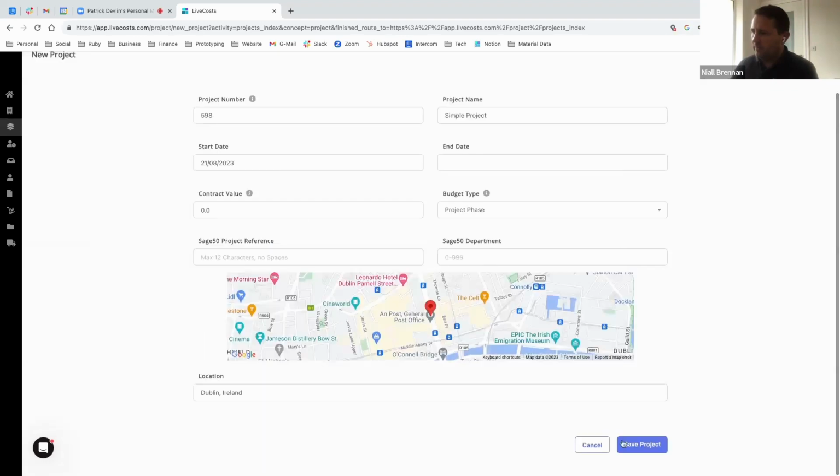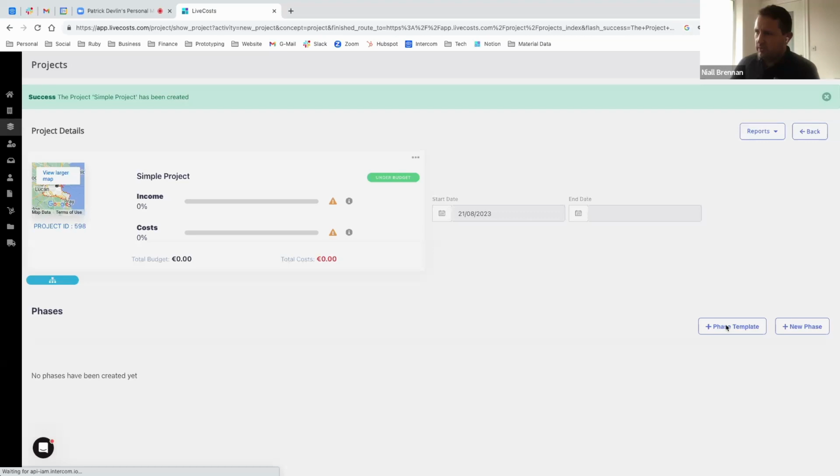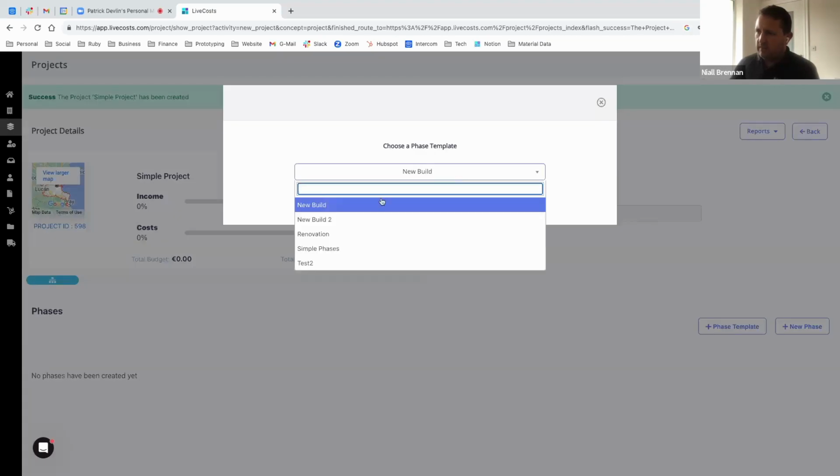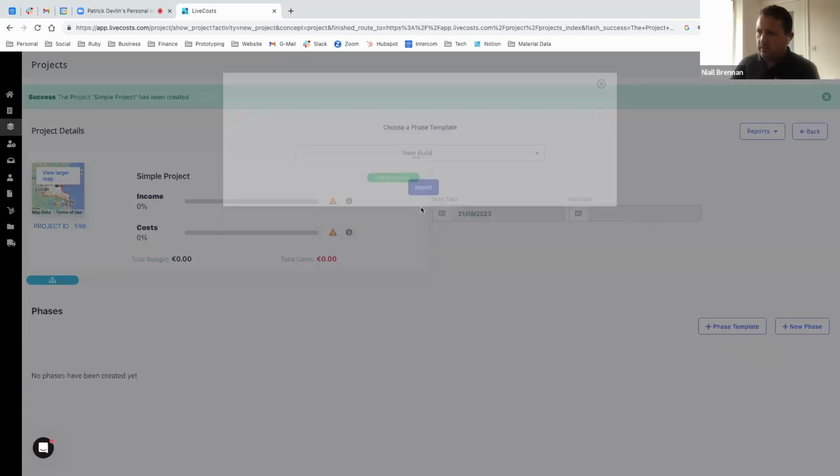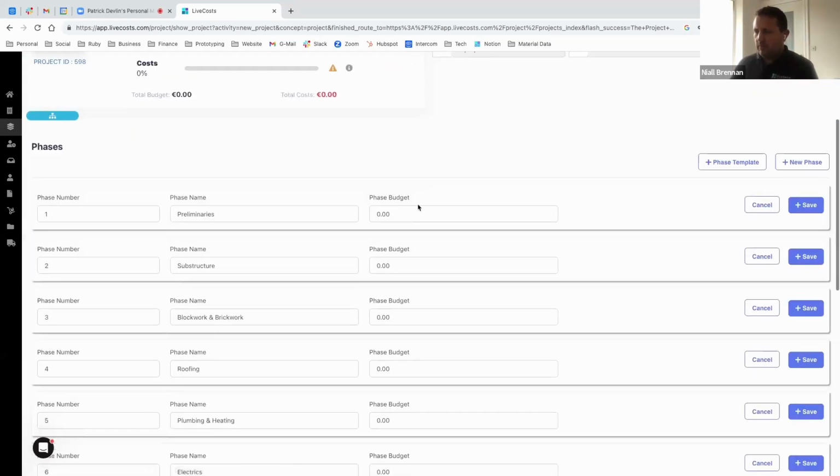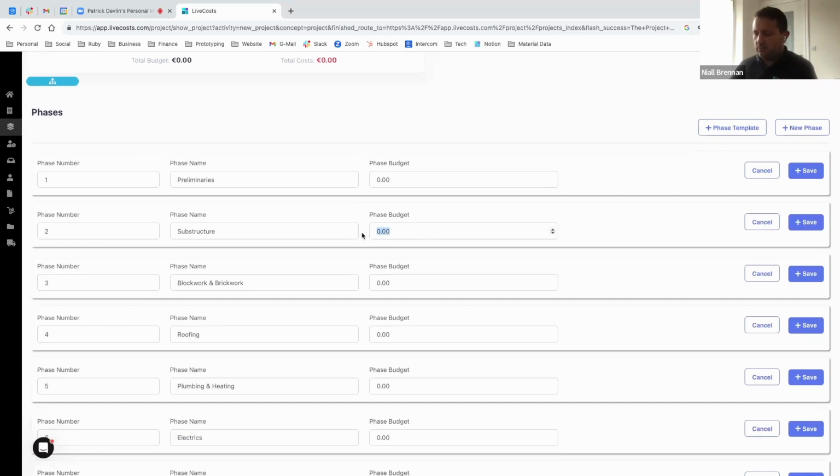Okay, nice and easy. Say the project gives us a project. What we would do then is use those common templates to build those individual budgets. So at this point, we're really just setting, okay, look, if we are in substructure, what is the expected cost on that? Generally, that cost is X VAT, X profit, X overhead. What is the raw cost?